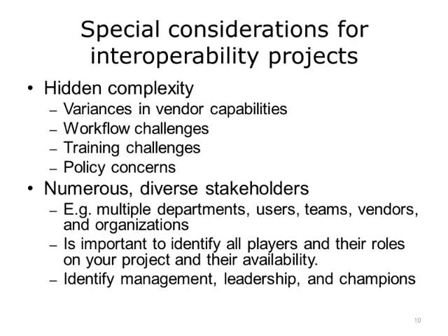Interoperability projects have special considerations. They often have hidden complexity, so be prepared to manage a growing scope. Complexities often include variance in vendor capabilities, workflow challenges, training needs, and policy issues, such as regulations affecting data sharing.